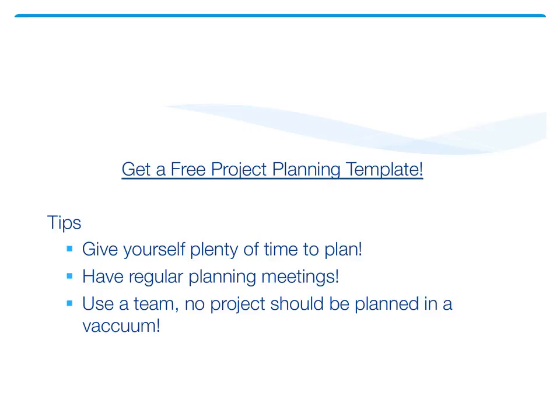I also encourage you, if you are putting together a project plan and it is a project you're going to pursue, that you have regular planning meetings. So maybe monthly, especially if it's a larger project. I've worked on a $2.3 million project, and I was the project leader when I worked for a manufacturing company, and we had meetings once a month for 3 years. And I know that sounds like meetings that might not be valuable, but every month all of us got on the same page with the project, so it's really important to have those regular meetings.